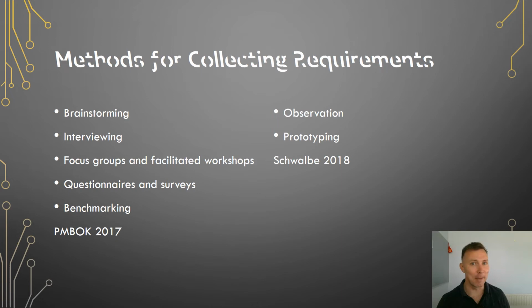PMBOK actually does make suggestions for ways of collecting requirements. These are brainstorming, interviewing, focus groups, surveys, and benchmarking. But other researchers also recommend observations and prototyping. There are lots of ways of collecting requirements, and you will choose methods that are appropriate for your client, for your environment, for your project, for your cultures, for your time, budget, and scope. In this unit, you're going to do lots of interviewing, but there are lots of other ways of collecting data as well.